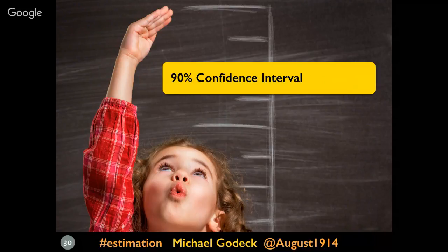So that range of 40 to 100 meters represents your confidence interval, but we haven't stated what confidence interval that represents at this point, right? If you're confident that the wingspan is going to fall in that range, but we don't want a 100% confidence interval, right? Because if you say that my confidence interval is 1 to 1,000 meters, you're absolutely going to be right, but that's not useful. So let's choose a lower value, and also just a 90% confidence interval. And other numbers might be used in other fields.